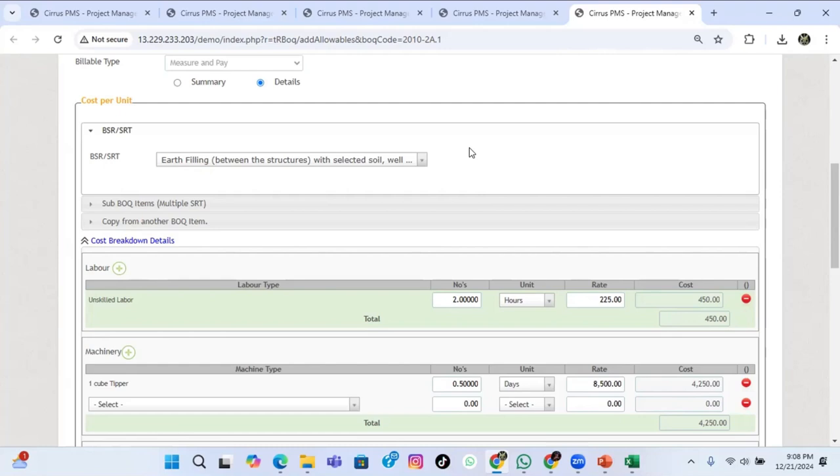So in the actuals, plan versus actual, you can also compare tender versus working BOQ versus actual. Yes, that is possible. So when our working BOQ cost is more, it will show as a loss, no? Yes, that is the purpose.